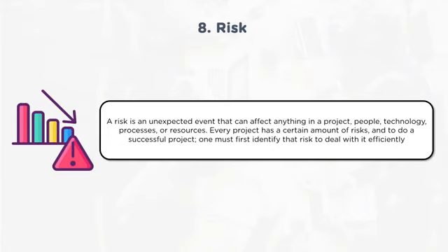So risk identification, analysis and assessment of that risk has to be done throughout the life cycle of a project. The reason being, a risk which looks like a high impact when the project is initiated may vary as the project progresses. Maybe in the middle of the project, the impact may be very high or low. So likewise, the impacts of the risk will vary throughout the project lifecycle. It may be positive, it may be negative.